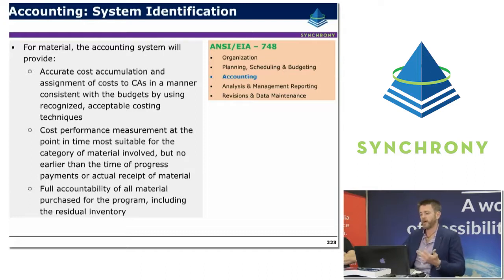So the ongoing theme here is allocation of actual costs in a manner that's consistent with the way they were planned. Once again, one of the side benefits of earned value is that it forces collaboration and alignment between cost control teams, or often project accountants in a traditional sense, and the planning and scheduling team who are allocating these budgets within the schedule.